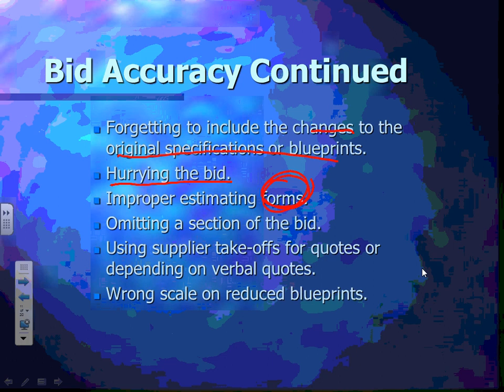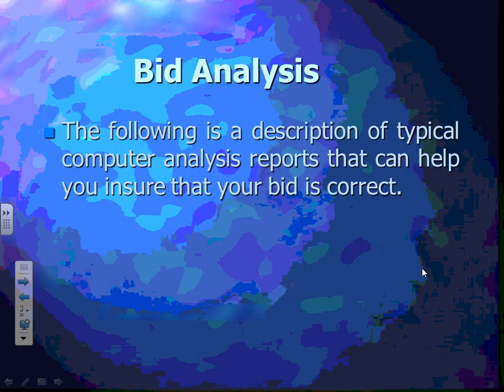Wrong scale. And we talked about this one many times, guys, when we went to Parsons and when we go to Hunt. They will tell you the single most important thing when you are working on it for your friend Chad, Adam: make sure that your scale is exactly what shows on the blueprint. Otherwise, garbage in, garbage out. So these are the things that you need to do in terms of bid analysis.